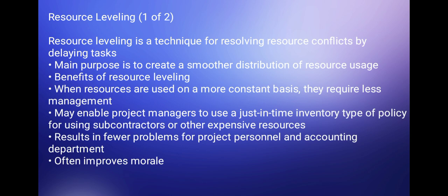Next is resource leveling 102. Resource leveling is a technique for resolving resource conflicts by delaying tasks. Main purpose is to create a smoother distribution of resource usage. Benefits of resource leveling: when resources are used on a more constant basis, they require less management, may enable project managers to use a just-in-time inventory type of policy for using subcontractors or other expensive resources, results in fewer problems for project personnel and accounting department, and often improves morale.